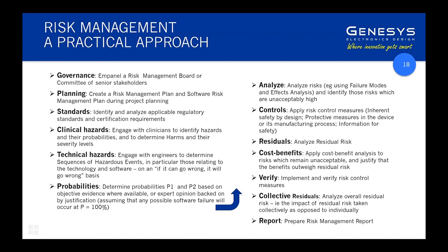So once we've determined the risk we need to deal with, we apply the risk control procedures or risk mitigation procedures to try and reduce those risks to an acceptable level, once again in terms of an objective calculation based on the reduced probability of hazardous situation occurring that is a consequence of the risk mitigation measures. Once we're left with residual risk that we can't reduce any further, we then analyse that to say if that's acceptable, and if it's deemed not acceptable, undertake a cost-benefit analysis to say that the therapeutic or diagnostic benefit of the device outweighs that residual irreducible risk.